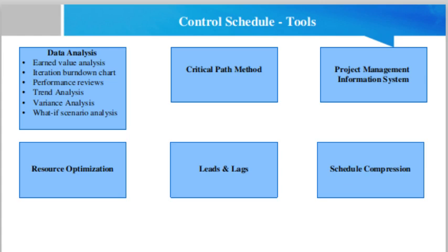Schedule compression. Schedule compression techniques are used to find ways to bring project activities that are behind into alignment with the plan by fast tracking or crashing the schedule for the remaining work.